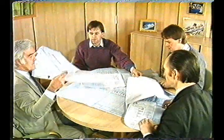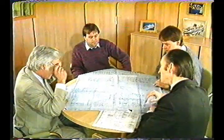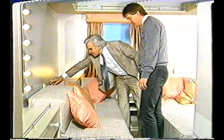The executives of Regency Marine needed to plan very carefully because the vessel had to remain in service as a cruise ship during the work period of 7 weeks. An important part of the preparation was the building of a full-sized mock-up of the new cabins, as they would be assembled on the Orient Express. This allowed the designers to check every last detail and gave the client an opportunity to bestow a final seal of approval.